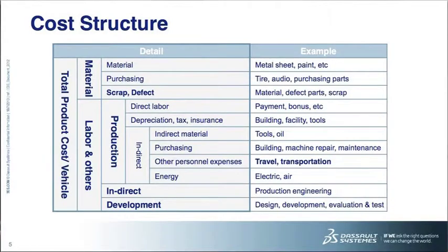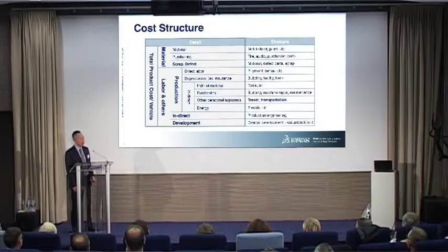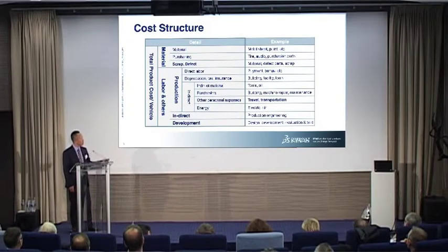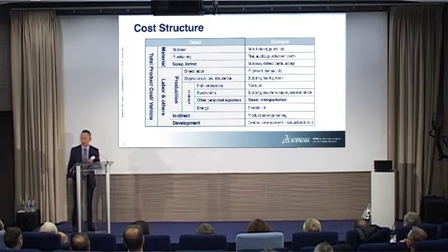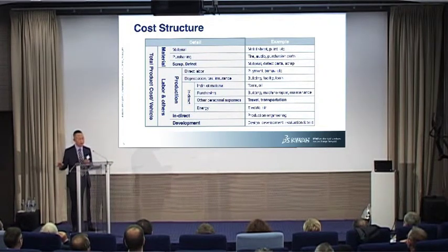And which kind of data do we use in each phase? Those are the data we are using in the cost planning phase. So the big cost, the easier one, is material cost. However, you can see defect and scrap. That also must be contained at the planning phase. Next one, direct labor, that's easy. However, training, transport, what does this mean? When we introduce a new factory outside of Japan, we have to send many people, right? Usually it becomes like 1 million, 2 million euro. Huge money. That also has to be counted.